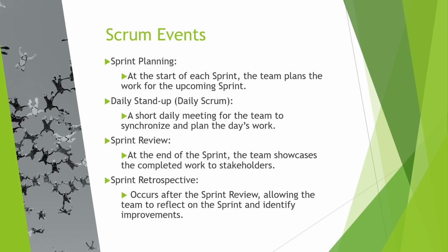Then there is a sprint review that happens at the end of your sprint. That allows you to review what was done, what was decided, what was completed, and then discuss those things and have a demo of things that were completed. Once that is done, the sprint review meeting can move into the retrospective. Okay, what did we learn? How can we improve? And let's see the plan for the next sprint.